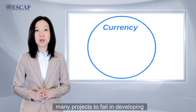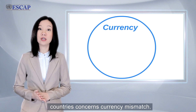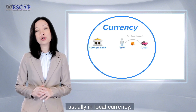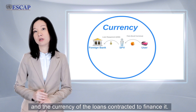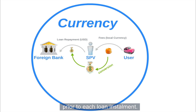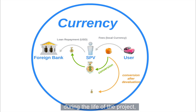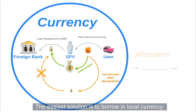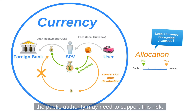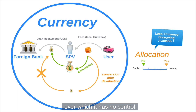Another financial risk that has caused many projects to fail in developing countries concerns currency mismatch. Such risk exists when there is a disparity between project revenue, usually in local currency, and the currency of the loans contracted to finance it. In this case, project revenue must be converted prior to each loan installment. If the local currency is devalued during the life of the project, revenue may not be sufficient to cover loan repayments. The easiest solution is to borrow in local currency, and the private partner should bear this risk if local currency loans are available. If they are not, the public authority may need to support this risk, as the private partner may not be prepared to accept a risk over which it has no control.